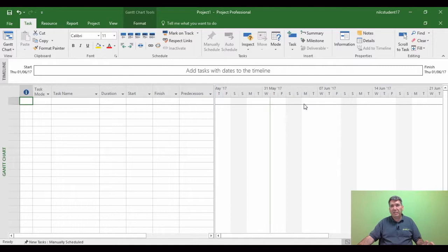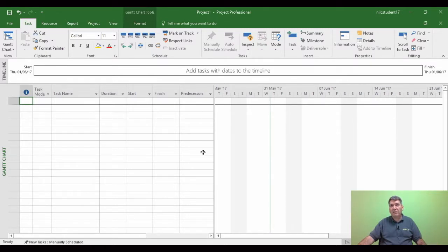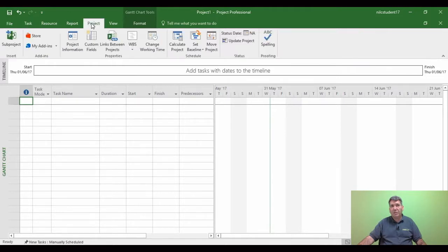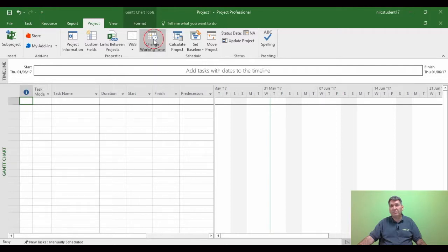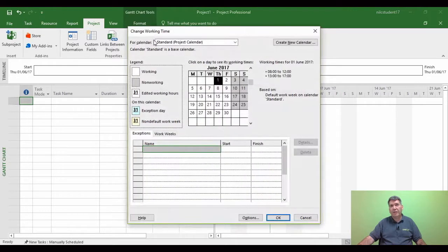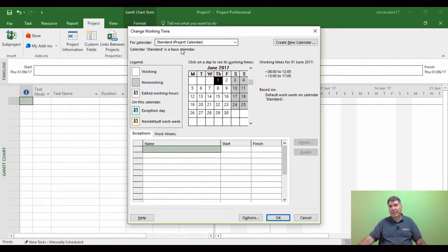We now need to use calendars to make this white and grey change to our specific requirements. Now the way to do this with calendars is through the Project tab. So Project tab, then we're going to go into Change Working Time. Now in Change Working Time, there's an area called For Calendar.